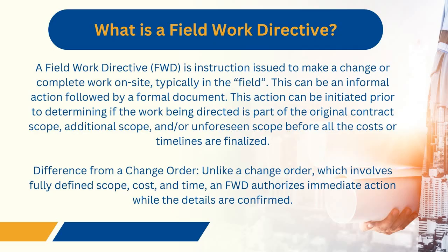A field work directive is going to be instruction that is issued to make a change or complete work on site, typically in the field. So this can be an informal action followed by a formal document. This is very important: recognize that the work of a field work directive is to be able to initiate an immediate response to what's going on out in the field, but it must always be followed by formal